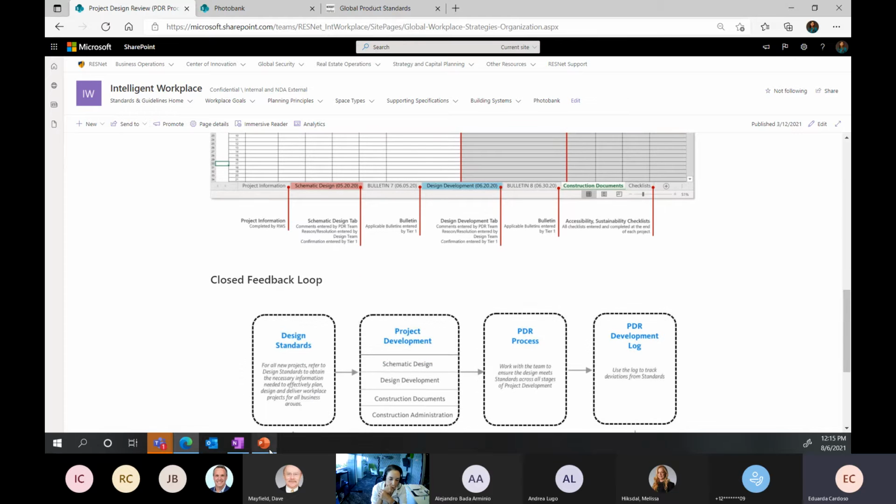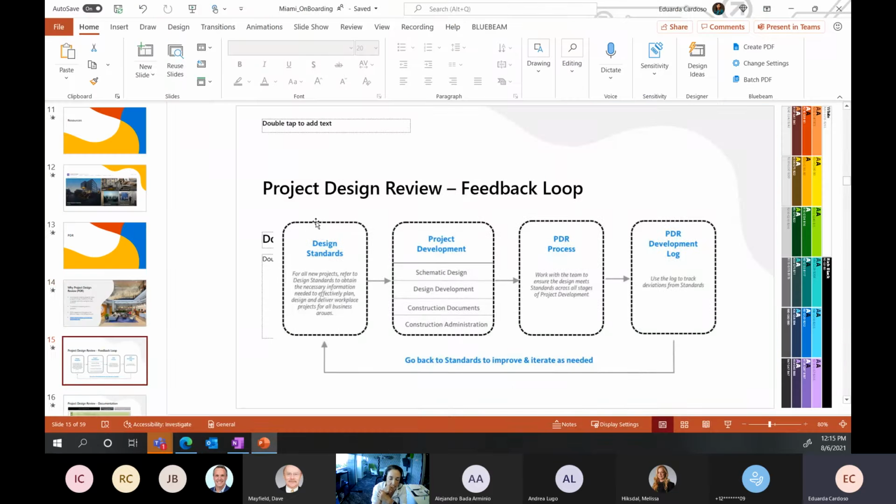And then just the purpose of the program. How long do they take to review that? It depends on the project size. I'm thinking it's usually a week for the size of project we submitted. It should take them a week to review the drawings and turn it back to us. Then we can set up a meeting where we all go through it together and understand their comments, et cetera. I'm going to be updating the project schedule to incorporate the PDR review, so I'll give everyone what the schedule looks like when that's done. Okay.